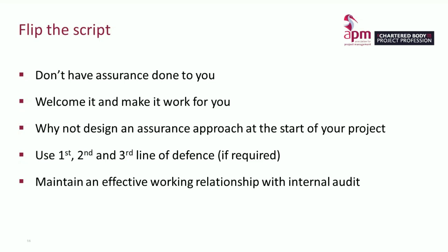Stop feeling as if assurance is something that is being done to you. And my best advice would be to design an assurance approach for each project that you work on. So at the beginning of the project, carry out a detailed risk assessment and design an appropriate assurance approach.